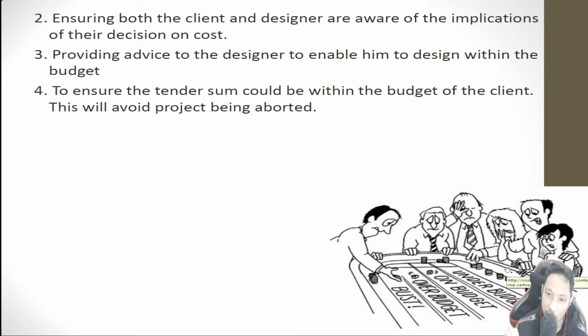Second is to ensure that both client and designer are aware of the implication of their decisions on cost. Every decision making will give implication to the cost of the project. Next is to provide advice to the designer to enable him to design within the budget of the client, and to ensure that the tender sum is within the budget of the client as stipulated in the project brief from the beginning of the project. This will avoid the risk of turnover of the client.